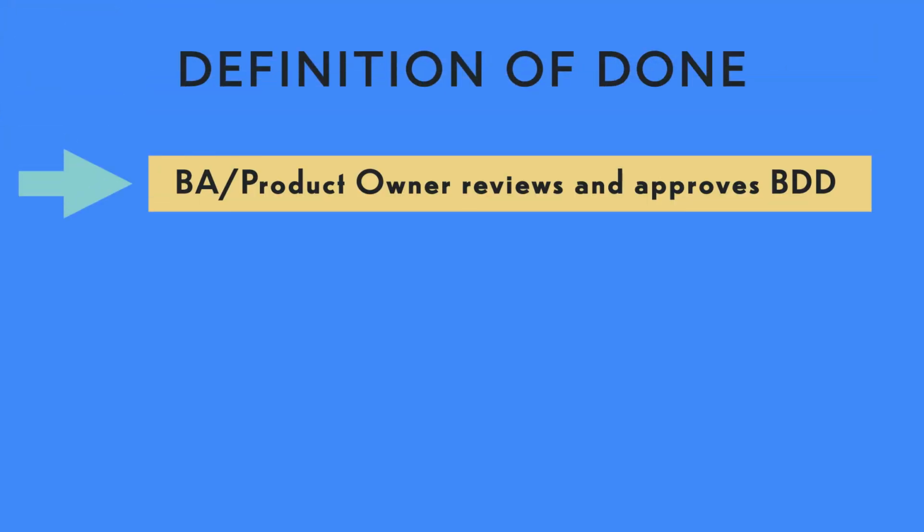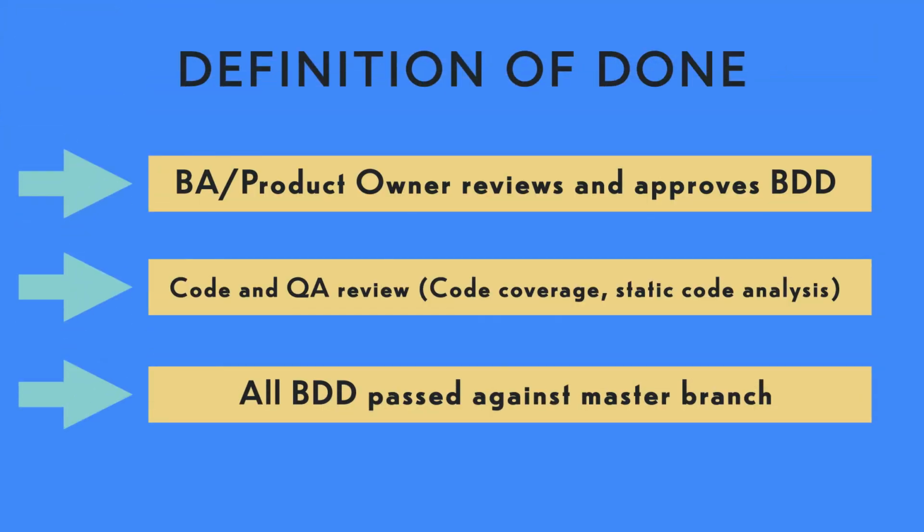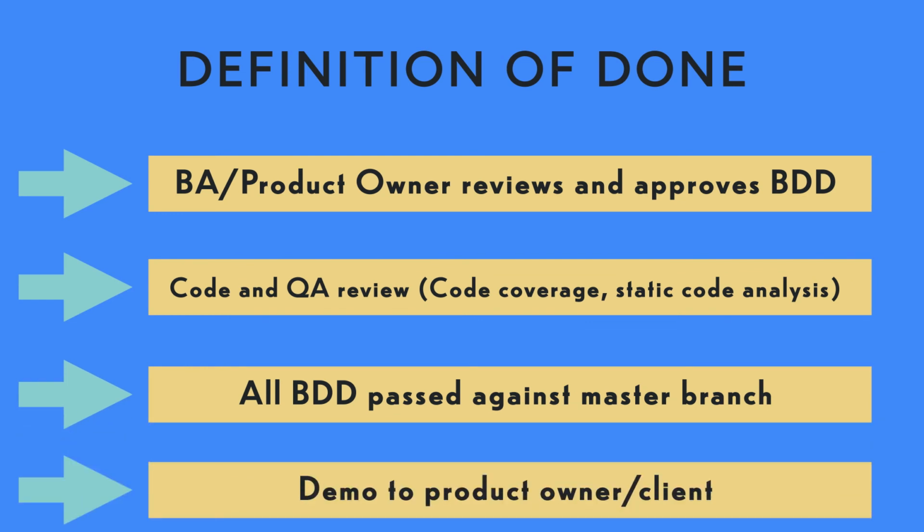When using BDD, it is quite important to manage the BDD in a separate repository, and only when all required BDD scenarios pass, the team should decide to merge the changes to master. Passing scenarios should be part of your definition of done. When merged to master, your CI/CD pipeline should run and make sure all your BDD scenarios pass, and only then releasing the changes to higher environments should be considered.